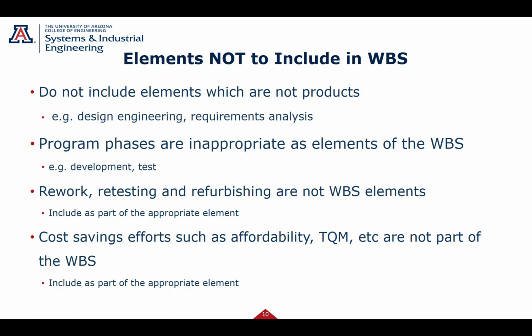Then you could have a test box, but the fact that you're just running a test is not a higher level deliverable. It might be some tasks. Rework, retesting, refurbishing, okay, those are all things you might have to do to get your product delivered, but those aren't boxes on your WBS.